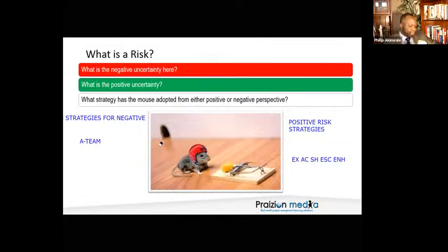So let's read. It says, for some risks, it is appropriate for the project team to make a response plan that will only be executed under certain predefined conditions if it is believed that there will be sufficient warning to implement the plan. Events that trigger the contingency response, such as missing intermediate milestones or gaining higher priority with a seller, should be defined and tracked. Risk responses identified using this technique are often called contingency plans or fallback plans and include identified triggering events that set the plans in effect.